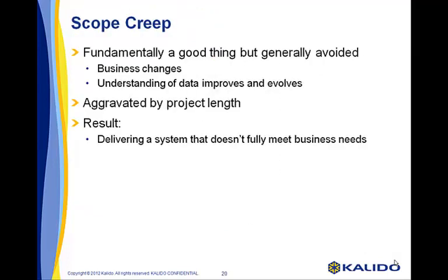Let's talk a bit about actively managing scope. In the traditional build world, this is called scope creep and is one of the words that shall not be mentioned. However, if we look at one of the root causes of scope creep, it is due to the business obtaining a deeper understanding of the problem, or their thinking on how to solve the problem has evolved. At the end of the day, both issues are good things. If we incorporate them, we provide a better product.